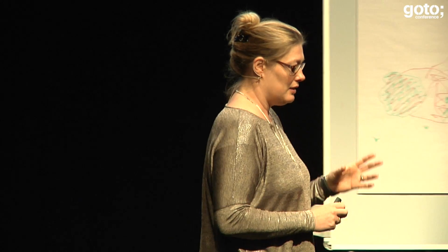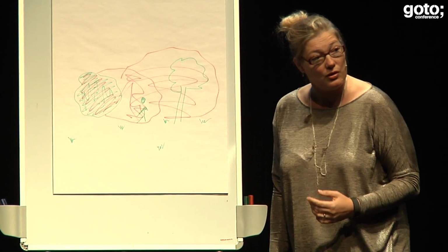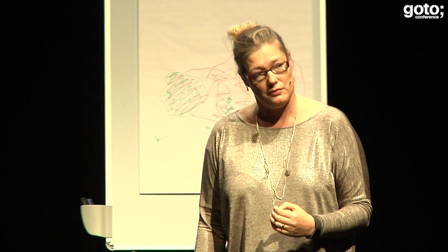So that's one answer. I also acknowledge in your question that sometimes there are things that come up, but they are never chosen. And there's sort of a legacy problem in the democratic way that we vote in the retrospectives, which is that if we have, for instance, just one tester or one UX expert, then that vote doesn't count much towards the other 6 that are only interested in the build. And what I do in those circumstances is, if I notice that it's a recurring problem, it's hard to see just from one retrospective, but if I see it as a recurring problem, I say, well, you have 3 votes for this kind of problems, and you have 1 vote for this kind of problems, to make sure that we actually focus on that part of the problem as well. But of course, you have to be aware of what it is.